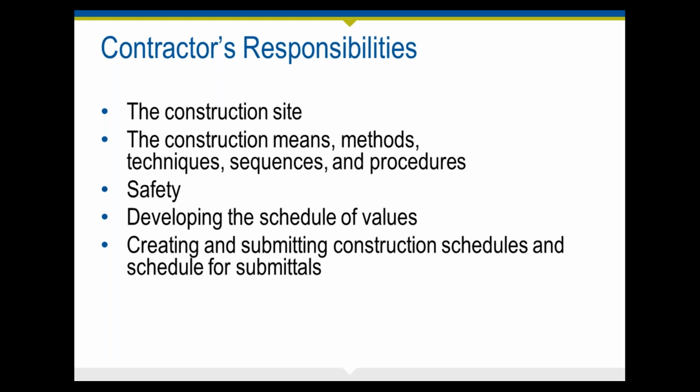The other responsibility that the contractor has is to develop the schedule of values, and we'll talk about that when we are talking about your responsibility for pay applications, which generally goes off of the schedule of values that the contractor has provided to the owner. And then also the contractor is responsible for creating and submitting construction schedules and a schedule for submittal. So all of these responsibilities lie with the contractor.